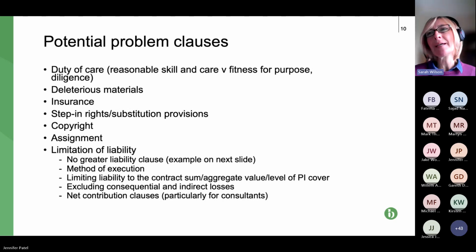But again, as I've already said, it's not increasing a contractor's liability. It's just moving the liability from one party to the next, because if a building is defective, the remedial works will represent the claim and possibly some loss of use. But the remedial works can only be incurred once, so that financial claim can be passed to a contractor, subcontractor, or consultant, but it can only be passed once. So it's not a huge issue.